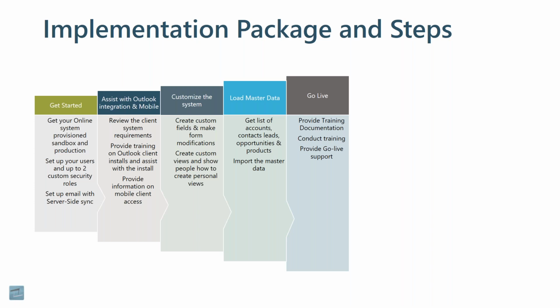Moving from customization to loading the master data. Again, clean data is going to be imperative, but moving to those accounts, contacts, leads, opportunities, and I mentioned the product catalog, so products, price lists. We'll definitely be able to explain the data structure in play. So there is a sequence to things. So we'll be guiding and consulting on that front as well, and then importing the data, executing that import using the out-of-the-box import wizard in Dynamics 365, and then we go to go live.